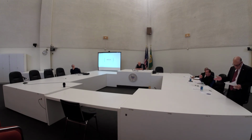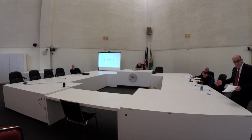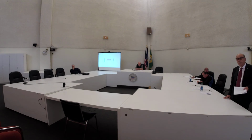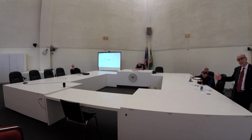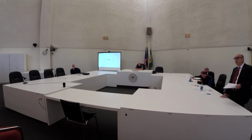We want you to tell us how you're going to develop a PM program and an O&M manual. This plant is 13 construction projects, 13 separate projects, and each project is required to provide an O&M manual to the owner. So you're going to get 13 contractor-level O&M manuals, and we want you to put them into a single O&M manual for the plant. You're not limited to the information given by the contractor. If there's information that you feel needs to be in there, we want you to include it.